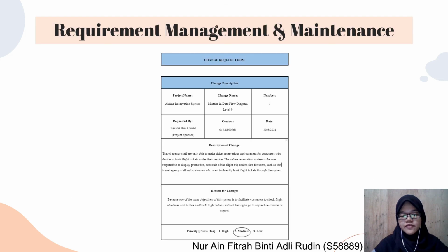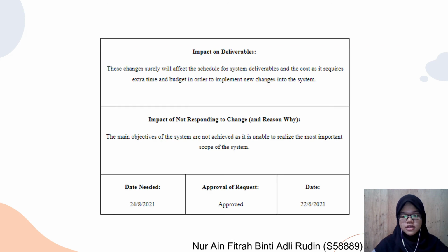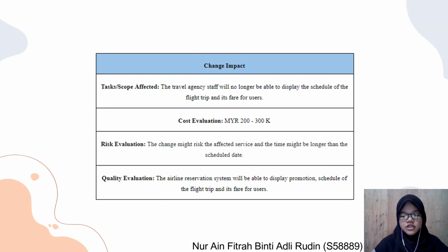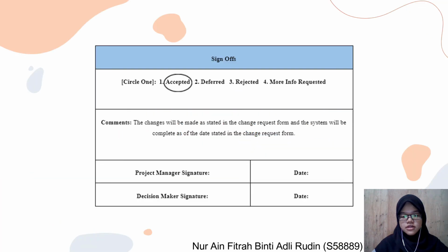So in order to fix this, we have provided change request form which containing the change description, the impact of the change, and also a signature space for the stakeholder as proof that they agree with the changes.